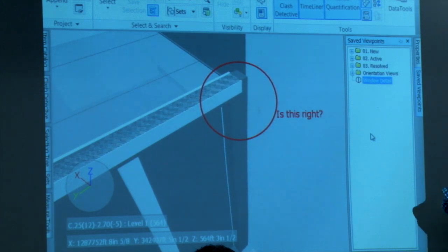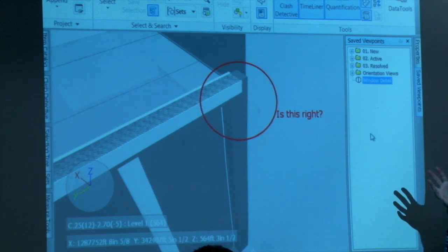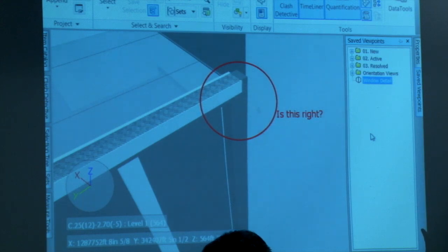Once you get everything all mapped properly, which is hard but not impossible, then the next time, it's really frustrating, I bet, if you're just about done with your takeoff and then there's an addendum and you have to go start over. I mean, with the models, if they gave you a new model, you would just put the new model in and hit calculate. If you mapped everything previously, it would just spit out the numbers for you.